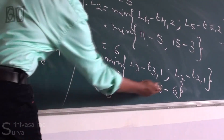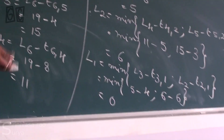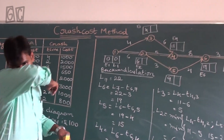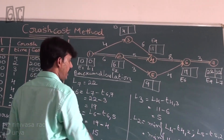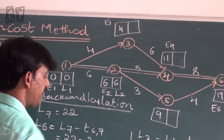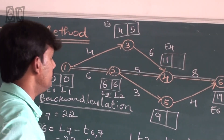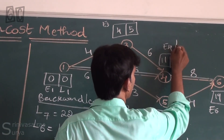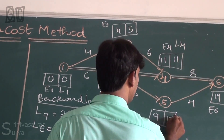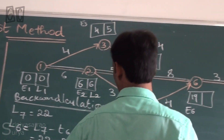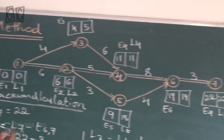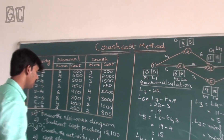For L1, the forward value is 0 and the backward calculation also gives 0. Summary of backward values: L2=6, L3=5, L4=11, L5=15, L6=19, and L7=22. These are all the backward calculations.